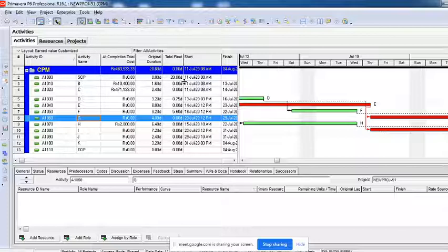Some plans can be changed without taking permission also. That is left to the PMC and contractor. These are the plans which do not affect the scope of the work, the cost, or the time. So if it is not affecting the work, time and cost, the changes can be made.